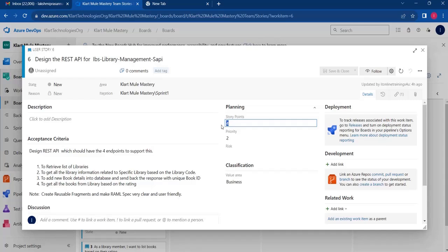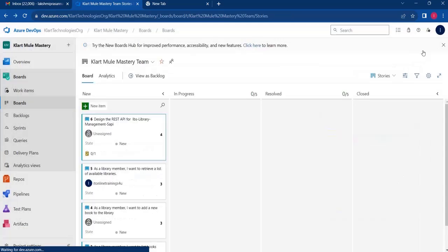Likewise, developers, the testing team, the scrum master, everyone will discuss in that sprint planning call. They will go through all the user stories one by one. They will see whether there are any dependencies, or whether you need more information to complete this assignment. We will discuss everything in that call. We will estimate the user stories first. That is the first step.